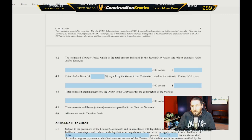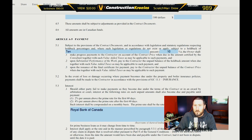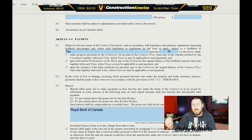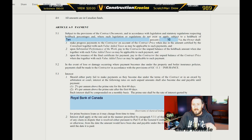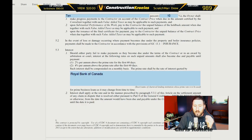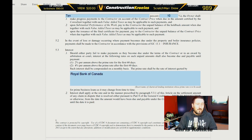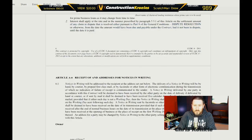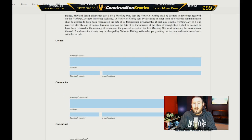Just look through it and understand — the payment section, for example. You're going to need to have progress payments. So when you get so much done, or there's a regular payment schedule — like on the 1st and the 15th or something like that — everything is decided up front before you sign off on a contract. This is so important to know as a pieceworker or subcontractor. Going into an agreement with somebody over a handshake is not going to hold up anymore. You need to cover yourself. Even if you're a pieceworker, you need to have some sort of contract.